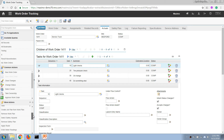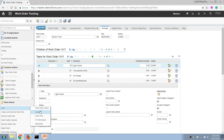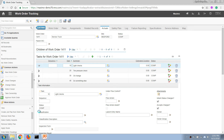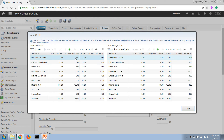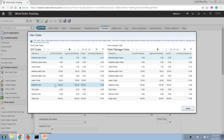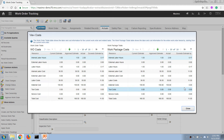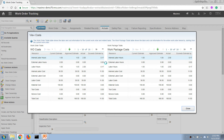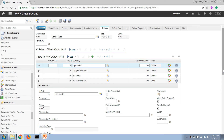To compare planned cost versus actual cost, we can choose 'View' and then 'Costs'. This will show the planning details — for example, the planned labor and material — along with the total estimated cost and the actual cost, allowing us to see the difference between the two.